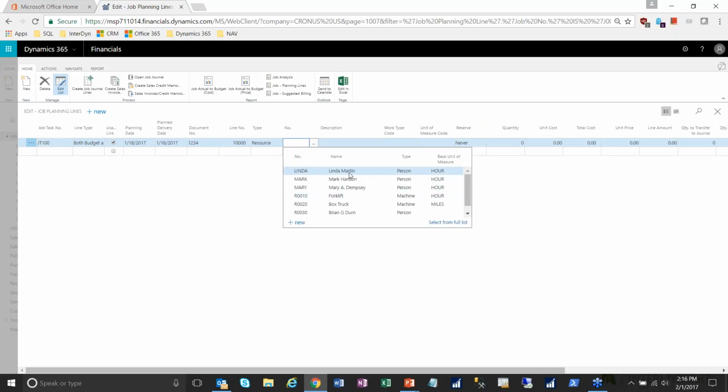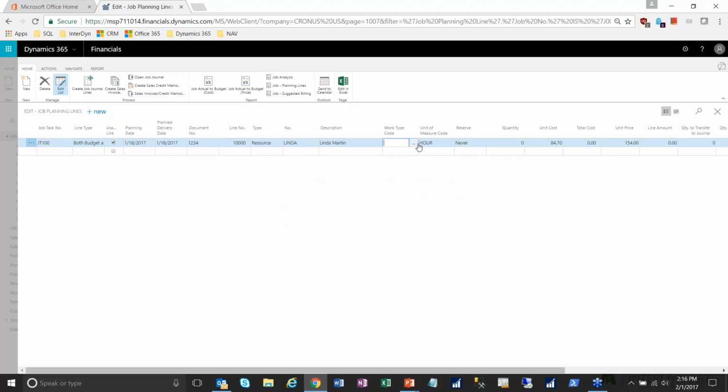So this is a list of all of my employees, and I'm going to schedule Linda Martin's time for this. She's going to be the consultant on this, and I'm going to estimate that it's going to be 2 hours. That it's going to take her 2 hours. This is the cost that our company incurs as part of her time, and then this is what we bill the customer, and then that's just the total quantity times the unit price there. So since this is now a plannable line, or it's on our planning lines, we can actually bring that into Linda Martin's timesheet for this week.